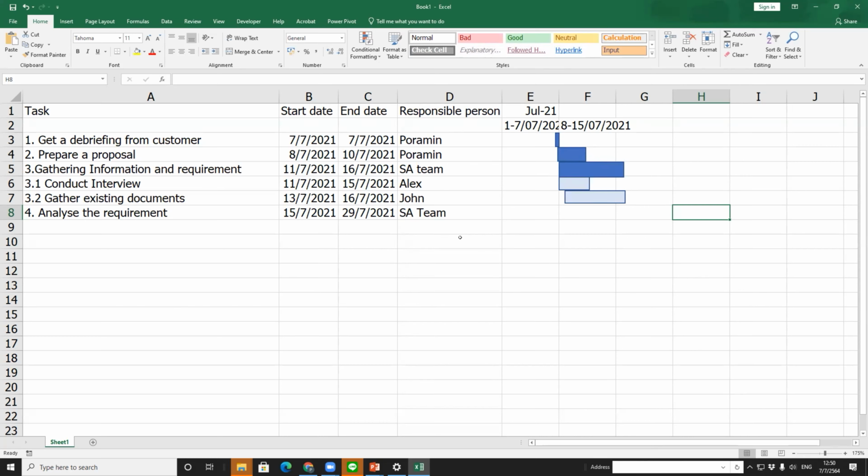For example, if they say, hey, I want you to study the new tools that we have to use, do you think how many days you can finish? If you say, okay, I can spend 6 days, and they negotiate with you, is it possible to make it 5 days instead? If you say 5 days, then they will just write it down in the Gantt chart and draw the bar. Because after you study the new tools, I'm sure you have following tasks, for example, they may ask you to start developing some parts of the project. So the faster you can study the new tools, the faster you can start coding that program. So all of the Gantt chart will just be shifted.